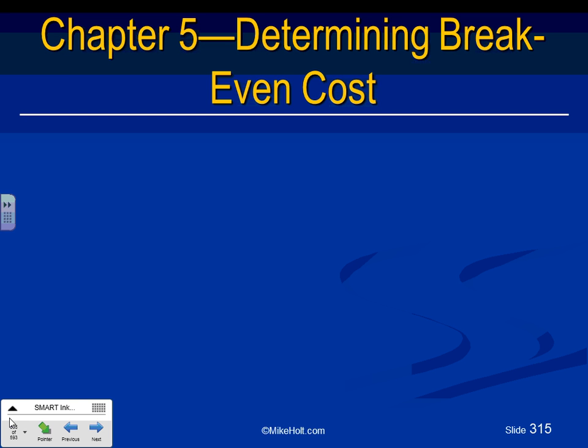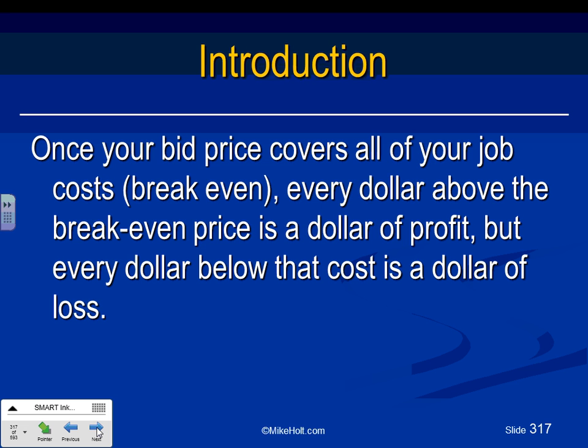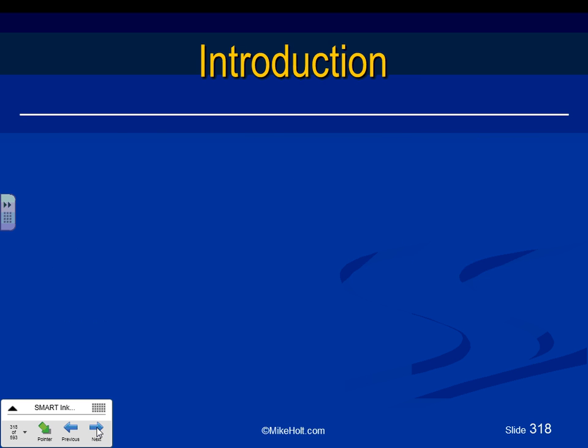Okay, a couple of things, guys, before we go ahead and start. This is just an idea. Why does anybody want to break even? Break even is called floating. You're not making money, but you're paying all your expenses. So nobody obviously wants to break even. Everybody wants to have profit. But why do we care about the break even, guys? Because the break even will decide how much it's going to cost you to do this job, labor and material. Without knowing how much it's going to cost you, you will not be able to know how to sell the project to the customers. So knowing the break even is a big deal.